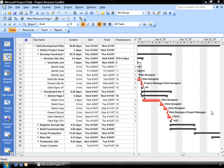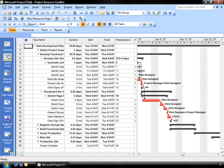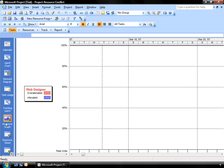Well, it has a couple of different tools that you can work with. Some of the views that are already embedded in the system are shown over here in our view bar. I could take a look at a resource graph. And here I have my web designer coming up. Now, you'll notice that he's in red. So this is automatically giving me an indication that there may be a problem here.